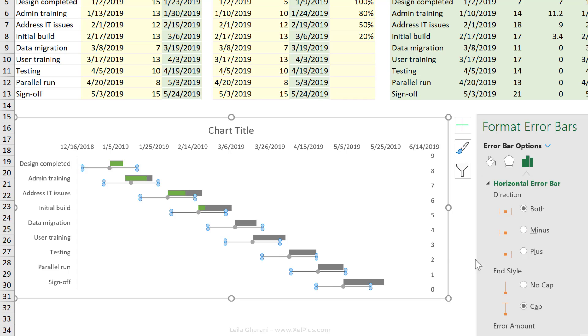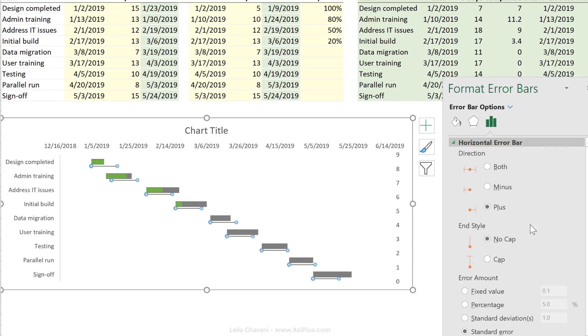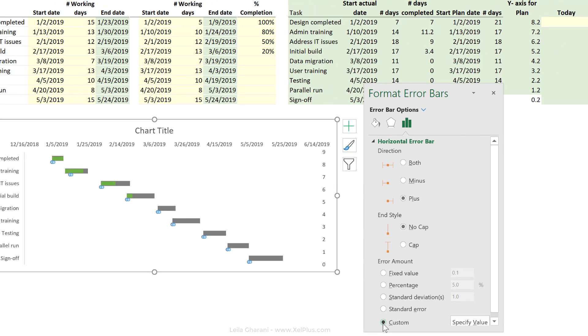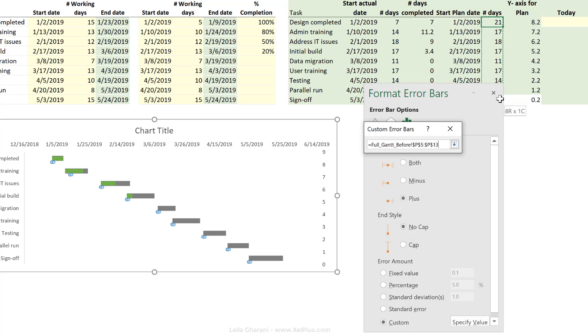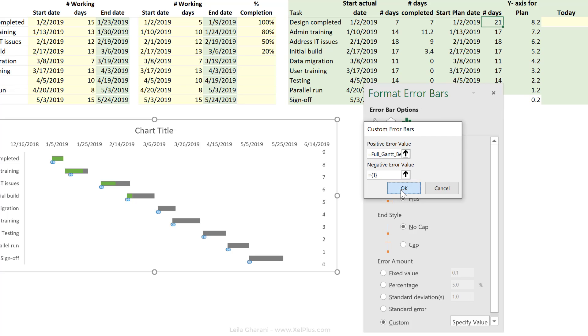Let's get rid of this box here. Now let's update how we want these lines to look. Our dot is here. We just want to show the plus side of it. We don't want a cap. And we want it to show a custom. And that custom is the number of days we've planned. Click on OK.